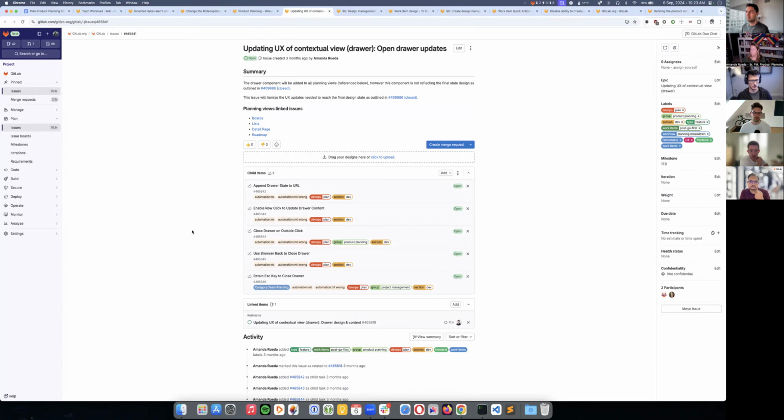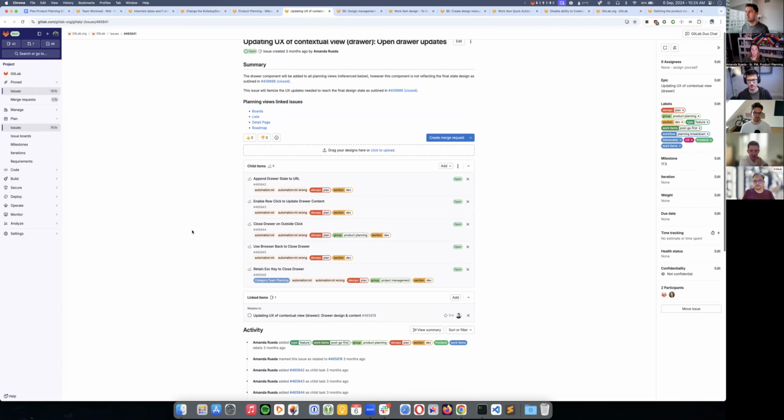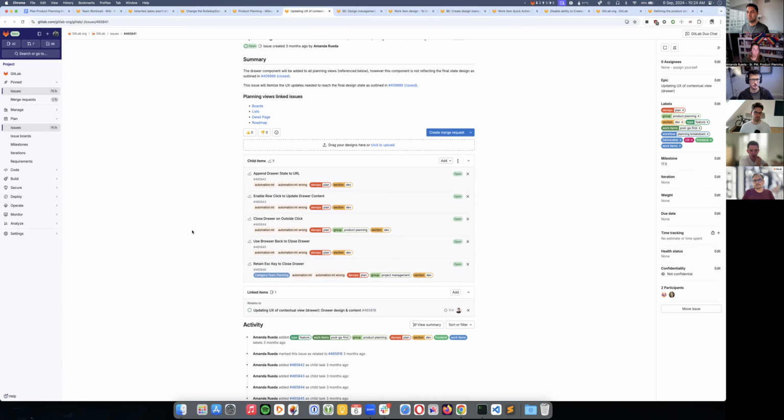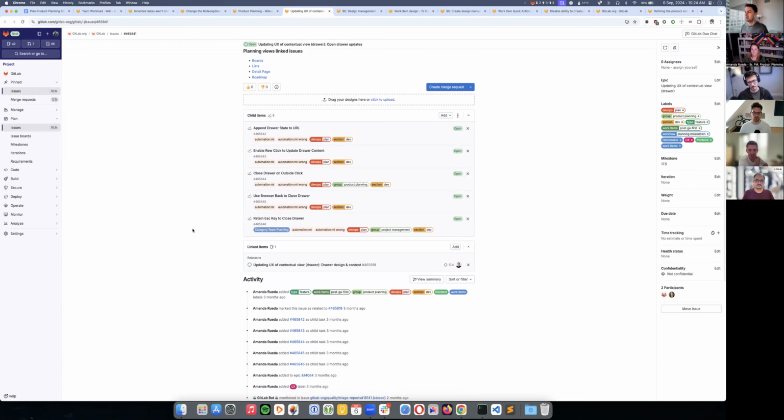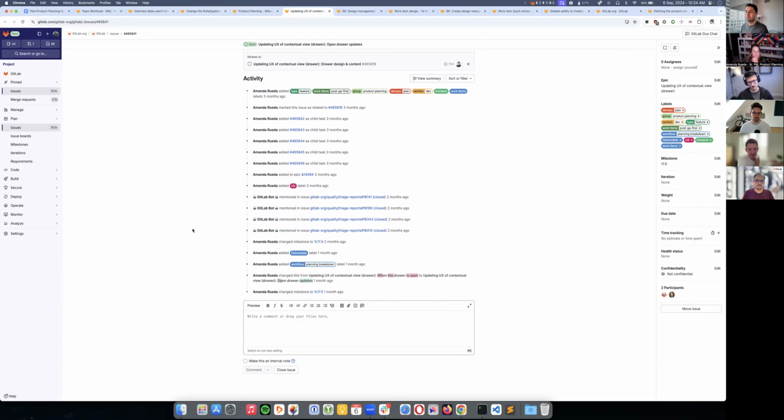So I feel like quite a lot of the stuff on here is kind of like don't-break-it tasks. Some of them are kind of zero weight individually. I would imagine that this is probably no more than a 2, I would say, for this particular part. Possibly less, but I don't want to underestimate. Okay, yeah. So I'll set the weight to 2 and will assign it to you, and feel free to change its weight if you realize that it is more effort than mentioned here.